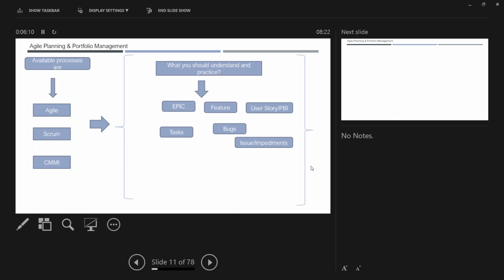So now someone will come and say, okay, the business analyst who is working with the customer, this is the Epic, creating an e-commerce portal, and what are the different features available in the e-commerce portal. Now this guy will say, to develop this e-commerce portal, we need to have a payment gateway. That is one feature. And then we have to have a front end. That is one feature. You need to have some business rules or a discount rules engine, which gives you discounts. That is one feature. These are at the high level, so you call them features, which is a level below your Epic.